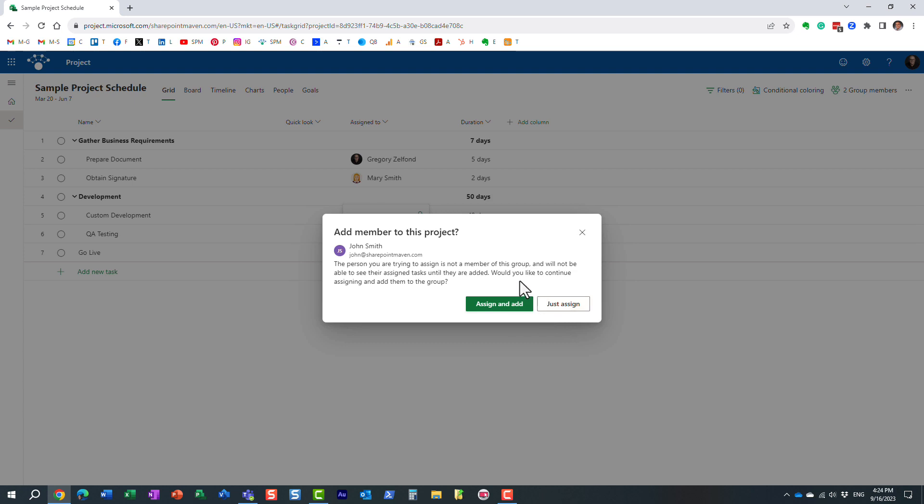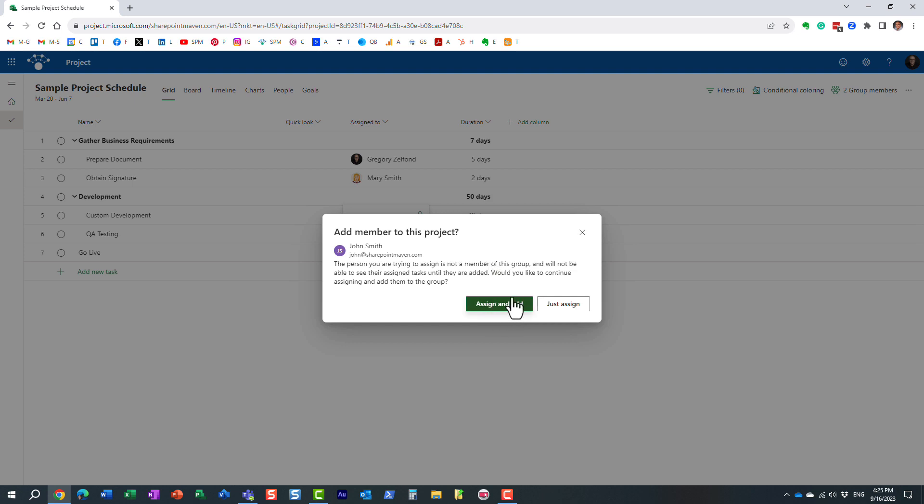Essentially, what it's saying is it gives me two options. Essentially, because John is not part of the Microsoft 365 Group, it's asking me a question: Do I want to just assign the task to John, or do I also want to assign John a task but also add him to the Microsoft 365 Group? And this is super important. Obviously, if I decide to do this, not only will I be assigning a task to John, I will also be adding him to the group.